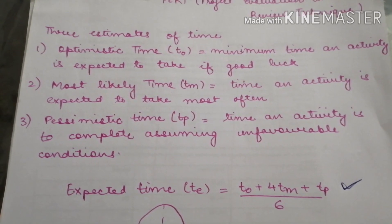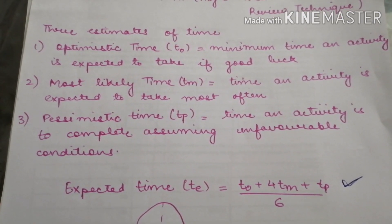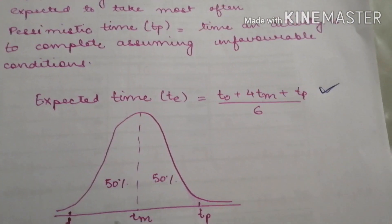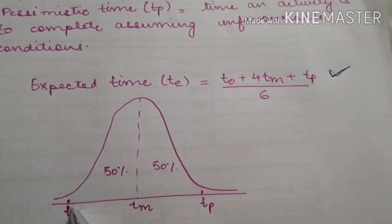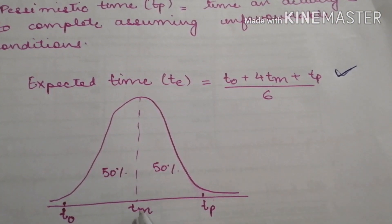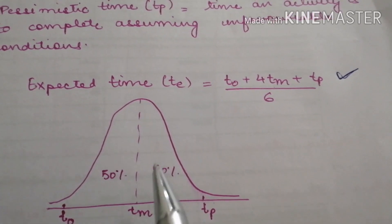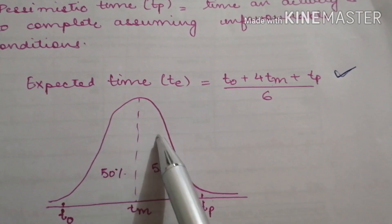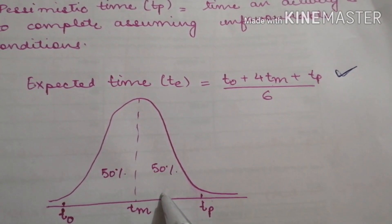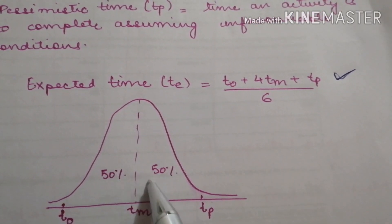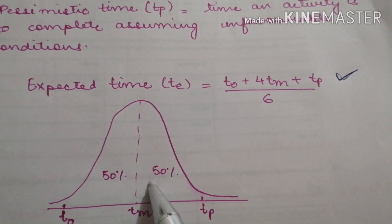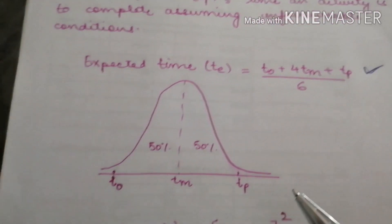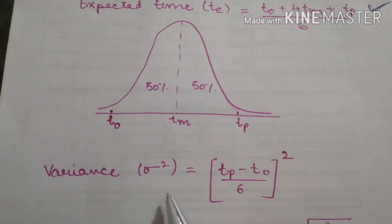When we are dealing with PERT problems, they always follow the normal distribution curve. We have optimistic time on one side, pessimistic time on the other, and most likely time in between. The area falling under the curve on both sides is 50%. We will be considering this when solving problems, and one more thing we will be calculating is the variance.